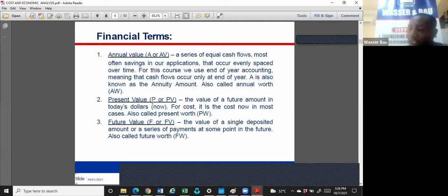That's why you see sometimes if a contract is awarded at, let's say, 2 billion naira in 2020, by 2022, if that project is not concluded, you'll start seeing reverse costs. Why? Because there is time value of money. So if the contract is 2 billion today, it does not mean in 2 years' time, in 3 years' time, that the project is still 2 billion. It is not possible.